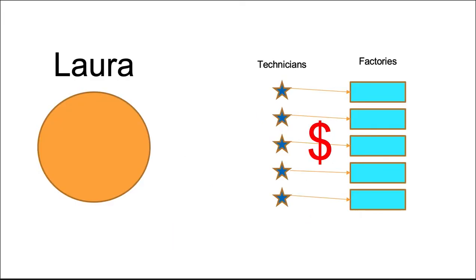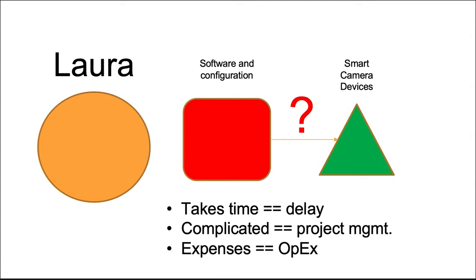Or, sending technicians out into the field after the cameras are already delivered to the factories to load the software and configure it on-premises. Either approach will introduce a week or more of delay, require extensive project management coordination, and introduce extra expense. If the smart camera supports SDO, all three of those issues can be mitigated.